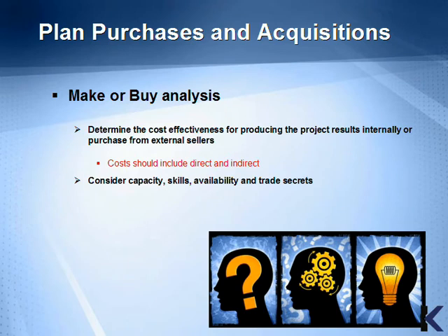To ensure that you can perform your cost-benefit analysis of make or buy, include both direct and indirect costs. Direct costs are the cost of the organization's resources. Purchasing department time would be an indirect cost. The other consideration is that you may need skill sets or experience that the in-house resources do not have. You would need to add training and extra hours for the learning curve for assessing the cost of the make side of the equation.